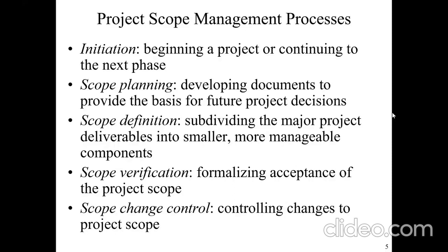Then after the planning has been done, we now define the work to be done. So we now subdivide the major project deliverables into smaller, more manageable components. So we now want to develop a website. Okay, build database, we use this, we use that. Okay, we'll develop the graphical user interface, we'll do the icons, graphics.